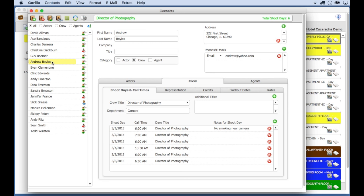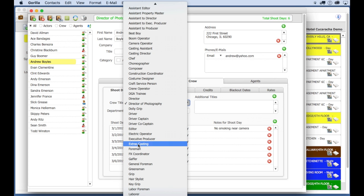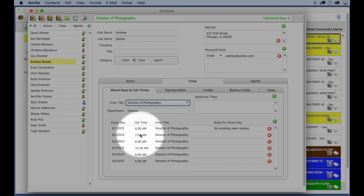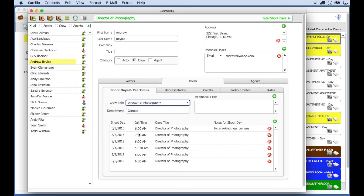Let's select a crew member. This is the DP. Here, you can enter the title for that crew member. And here, you can enter the shoot days that crew member is needed for the shoot. And of course, their call time.